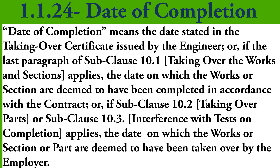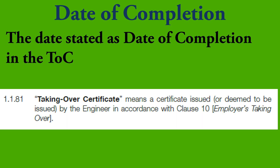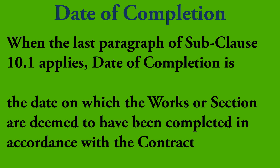As you can see, there are four instances that relate to Date of Completion. The first one is simple: the date stated as Date of Completion in the Taking Over Certificate, or TOC, issued by the engineer. The second instance is if the last paragraph of sub-clause 10.1, Taking Over the Works and Sections, applies — the date on which the works or section are deemed to have been completed in accordance with the contract.